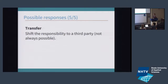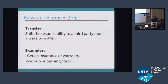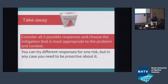The fifth response type is transferring the risk — sometimes you can shift the responsibility to a third party. It costs money, but you can get an insurance thing or recoup some publishing costs. For every risk, don't just blindly say we've got to prevent this risk and do everything we can to stop it. It's about keeping an eye on it and choosing the appropriate response. It's important that you're proactive — so in terms of ignoring the risk, I would call it accepting the risk and keeping a monitor on it.